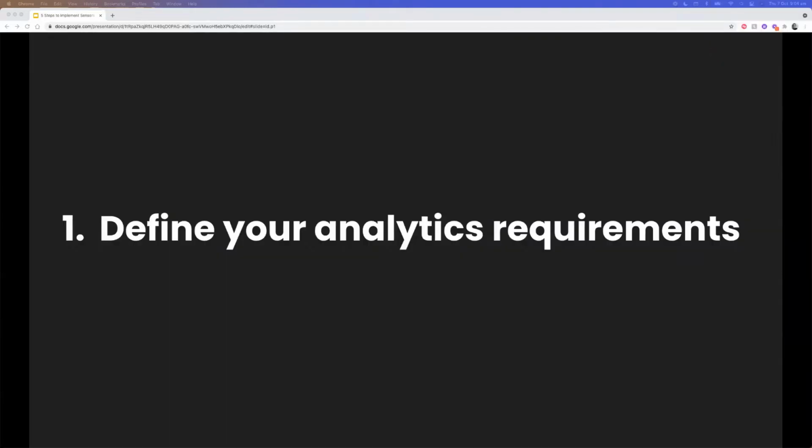So we like to start, when we are talking about a deployment, with firstly defining the analytics requirements. The analytics is the output and the end result of doing a deployment. So we like to start here and then work backwards, and that does provide a good framework for doing a sensor deployment strategy. So if you're not 100% sure about the types of data and reports different stakeholders need, or how far you'd like to extend different use cases into the future, you can end up deploying sensors incorrectly, or worse still, installing the wrong type of sensor for your longer term needs.